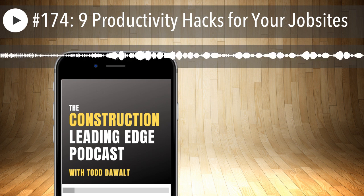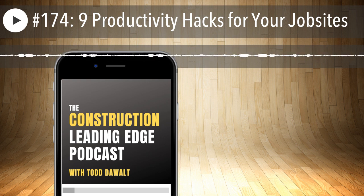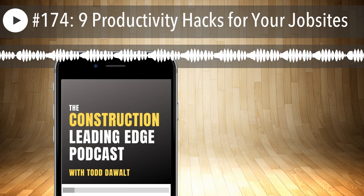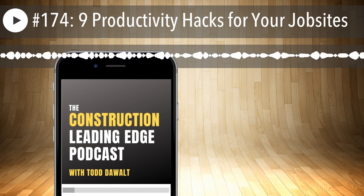So batch communication. What that means is you establish 2 to 3 times a day that you will talk or meet with your team. This could be in person, by phone, by Zoom, whatever. But establish 2 to 3 times a day that you will talk or meet with your team leads. Both of you should hold your questions and issues until those scheduled times.